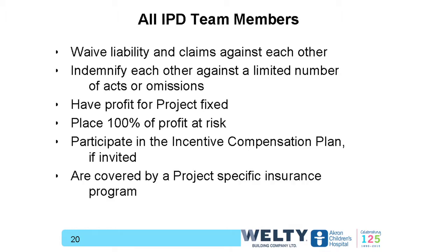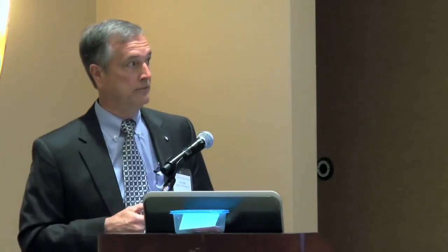In this particular project, we created a project-specific insurance program, an owner-controlled insurance program, which included not only your general liability and your builder's risk, which is traditional in a construction contract, but it also included the professional design side. Because again, you have to realize that we had the contractor sitting in the same meetings during the design, making recommendations, and we didn't want people to say, you know, I can't participate because my insurance doesn't cover me. That's outside of my expertise.